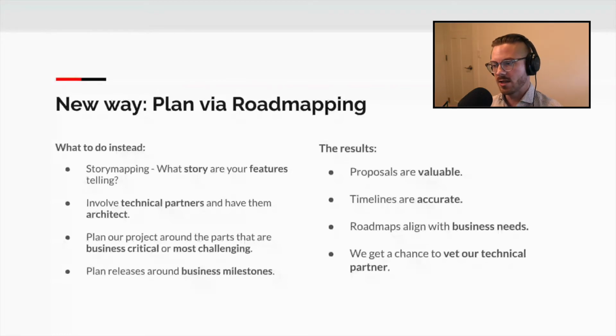We're going to plan our releases around business milestones. So it's not just, hey, you've given me this spec and I'll have it to you in about 6 months. It's, hey, you've given me this product. We're going to build it, but you have a conference that you want to go to in 2 months. What can we deliver in 2 months that you could show off at that conference and actually start to generate interest, maybe even start signing LOIs, that kind of thing?